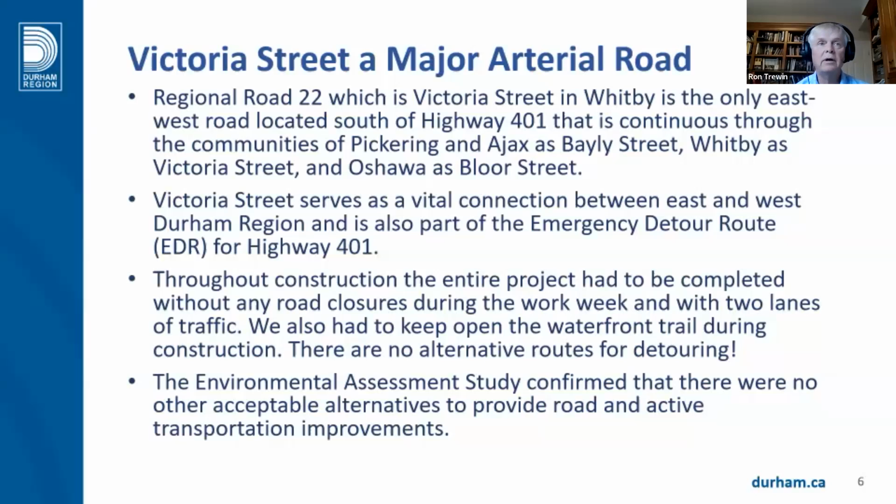Throughout construction, the entire project had to be completed without any road closures. We also had to keep the waterfront trail open. There is no alternative routes for detouring. The environmental assessment confirmed that there were no acceptable alternatives. First, I would like to dispel any thought that we could close the road during construction or find another alternative to expand the road system.